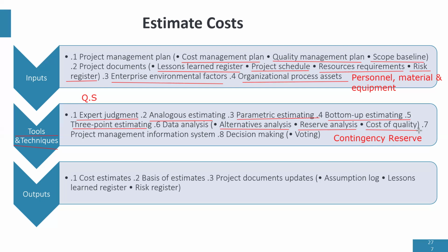So in practical terms, if you are working on a project where you have to do some testing, the cost of those tests is going to be added into the cost of the activities of the project. It's called cost of quality. So when you're building a house, a soil test is part of your cost of quality. Or when you're doing a concrete test, it's part of your cost of quality. It's the money you spend to ensure quality, and it's going to cost you.